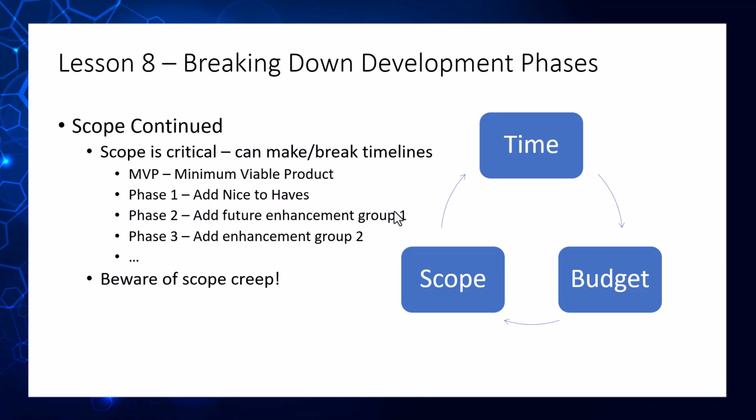And then as you go through, maybe you include an enhancement or two. Maybe you say, you know what, no enhancements, we want just the core pieces until we've really proven the concept and gotten user feedback or maybe even some sales. Right? Once you have that MVP, then you can start iterating through and going with a phase one. Okay, now let's push a round of 10 new enhancements to the application. Now let's push in another 5. And you can iterate through that way in order to manage the budget of the application.